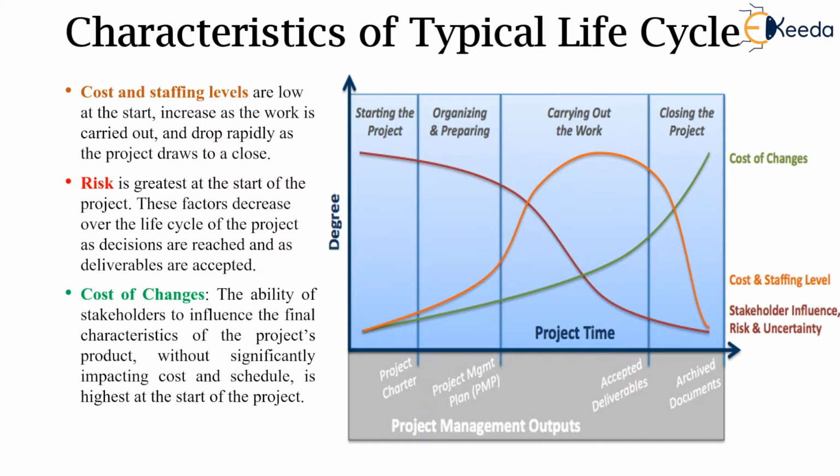As and when the project progresses into the planning stage and further into the execution stage, once the drawings etc. are freezed, if then the stakeholders, the client, wants to make some design changes, then the cost significantly rises because already the procurement plan is made, designs are freezed.